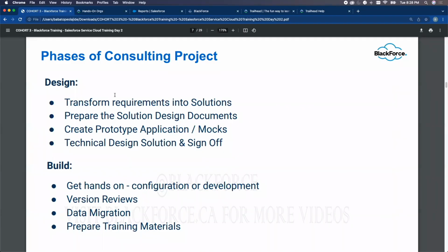Technical solution design is when you are developing your model, your data model, objects, you are bringing accounts, contacts, and opportunities. One of the things that you would realize is that you have already analyzed that you need to create a custom object. But what if the license does not permit creating a custom object? So you need to have done your analysis. Your analysis includes even the license you need to get, okay? This is part of preparation, analyzing and planning of a project.